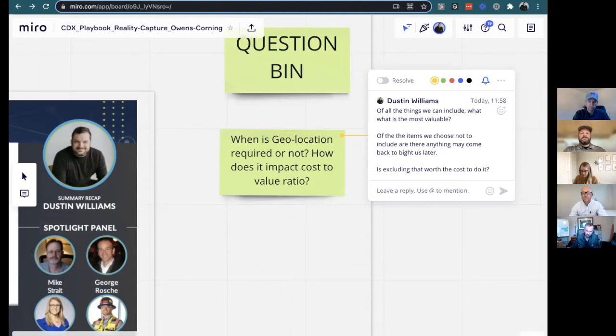And I think in terms of reality capture, I also wonder, thinking of the business case, like you're trying to just make money, right? It's about making money. It's about building a job so you can go to production. The one thing I've noticed you can do on top of, with time, you can save time, right? Because you can know where things are built. You can hold subcontractors or GCs accountable to say this is not right. And if you do that early enough, they start building the building better as like a high rise goes up or as an industrial plant gets built out. And so there's like a benefit there, right? Because people know they're getting watched. You get what you inspect, not what you expect.